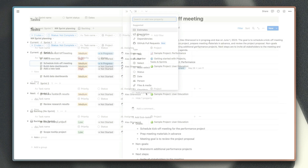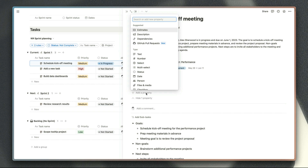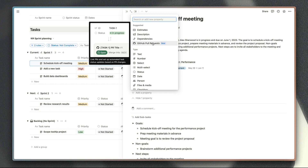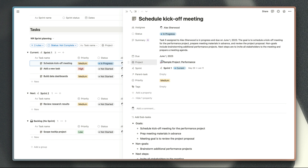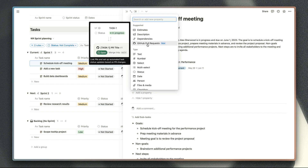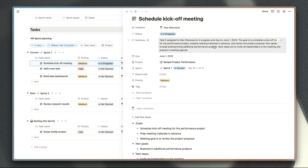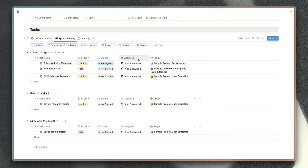Just to quickly show you, if you're an engineer or a developer and you'd like to link your GitHub pull requests to tasks in your task database so that when a pull request is merged the status of your task is updated, you've got this new GitHub pull request property here. The only thing to bear in mind is if you have an ID property in your task database and the prefix doesn't match the format automatically assigned when you first duplicated this template from Notion, you won't have the option to configure that property. Your task IDs need a certain prefix for GitHub to automatically recognize them, so if you customise your ID property you may need to change the prefix or delete it before adding that new property.